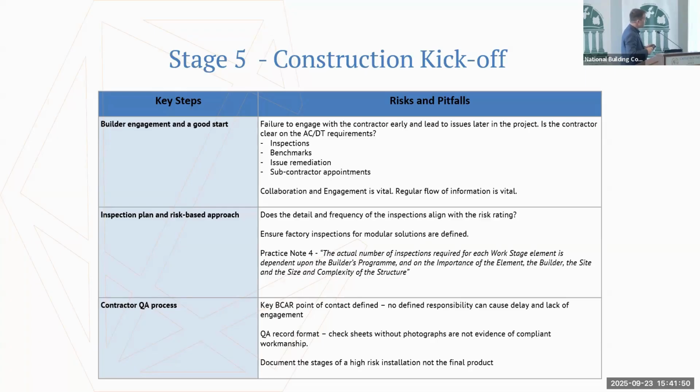Benchmarking and first of kinds as well. Have that conversation about benchmarking high-risk installations, so doing a first of kind: install something with all the design team and specialists present first before you repeat that 100 times, which can sometimes lead to abortive work.